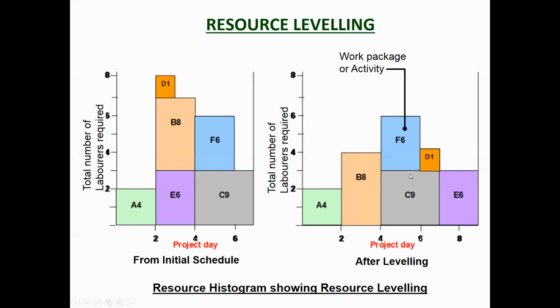So you're actually using your resources consistently. Now with labour it's not so much of a problem because they can drive to site or drive to another site depending on where the work is, but something like an excavator, if you bring an excavator to site, you can't really move it to another site without extra cost. So you really want to get that excavator to site, get it to do the work that it's supposed to do, and then move it to the next site rather than have it sitting around doing nothing for a few days.